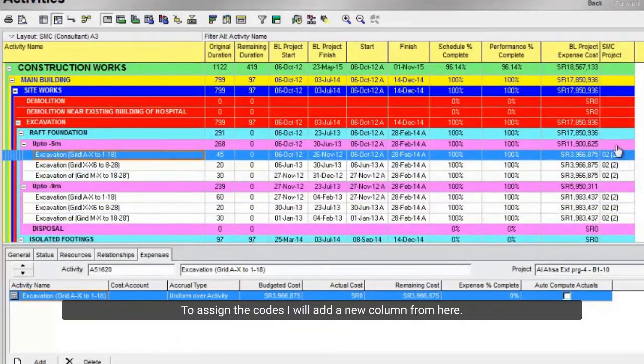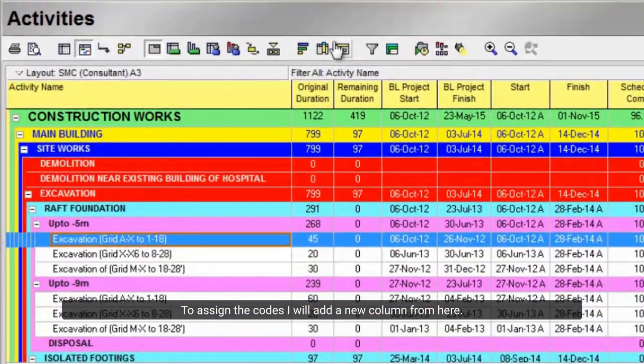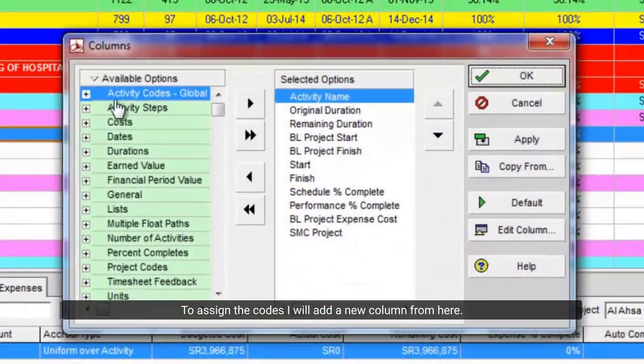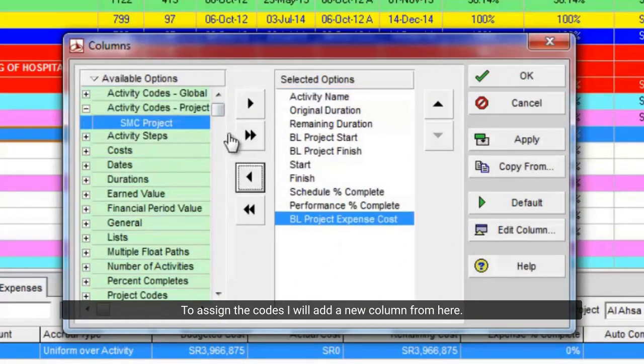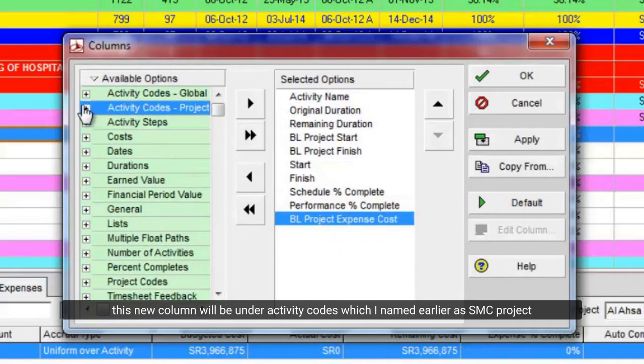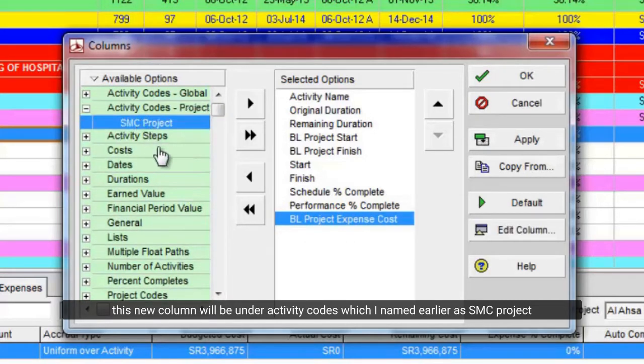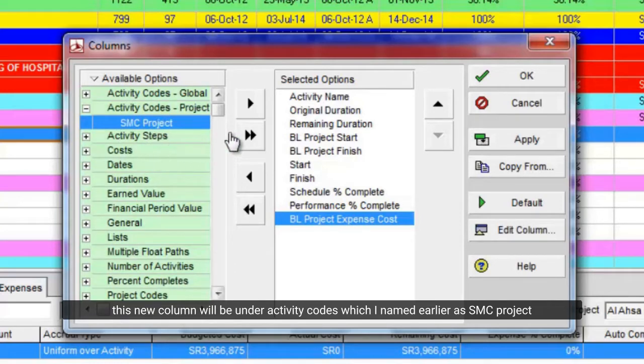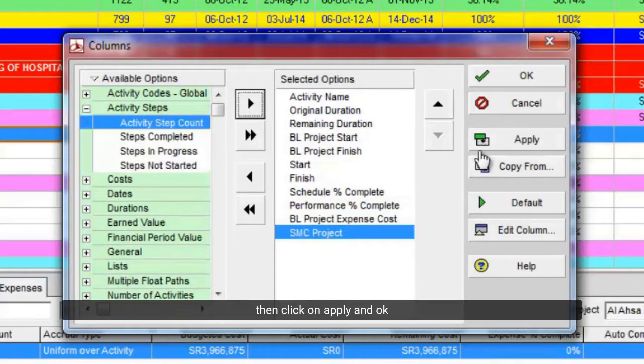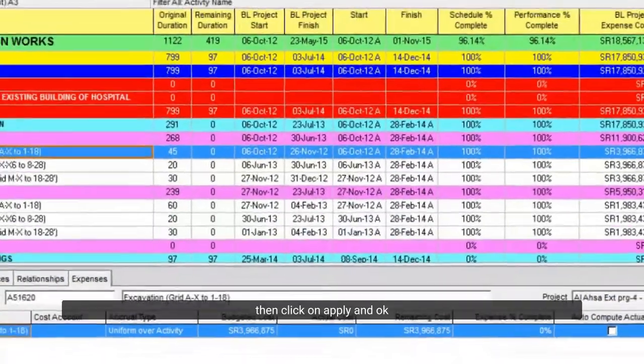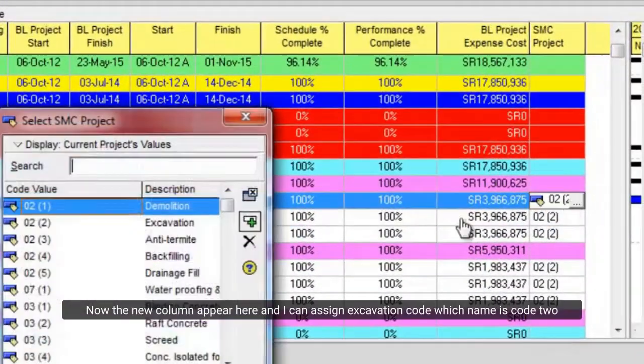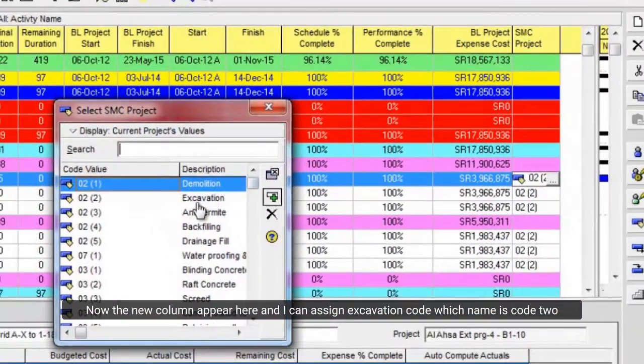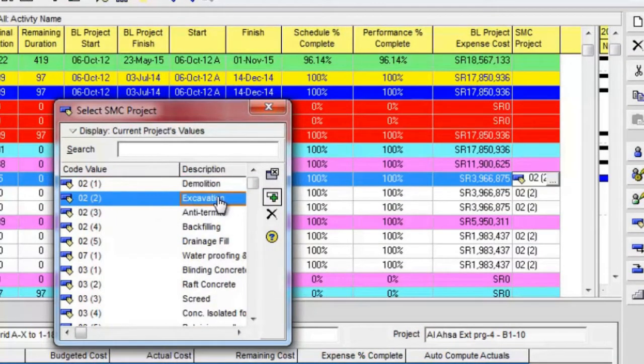Now you can see these activities under different WBS, and it is related to excavation works. To assign the codes I will add a new column from here. This new column will be under activity codes which I named earlier as SMC project. Then click on apply and ok.